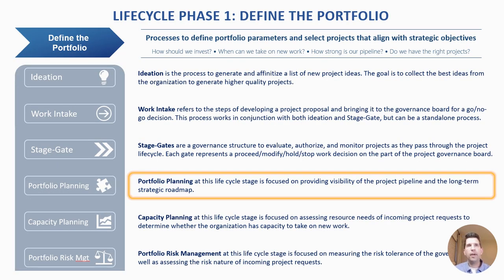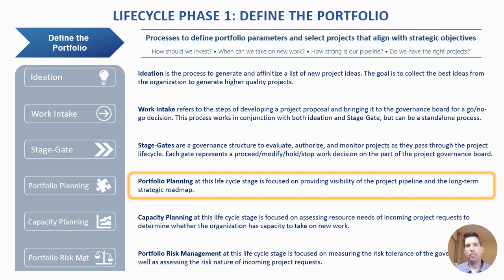This slide highlights where roadmaps come in as it relates to portfolio planning. This is a summary of the first lifecycle phase in portfolio management — defining the portfolio. Portfolio planning at this stage is really focused on getting visibility of the project pipeline: everything we're doing, as well as the long-term strategic roadmap. We can get visibility of what's in the current pipeline, and that'll help us identify if we need to add additional projects, or even when we should add them.